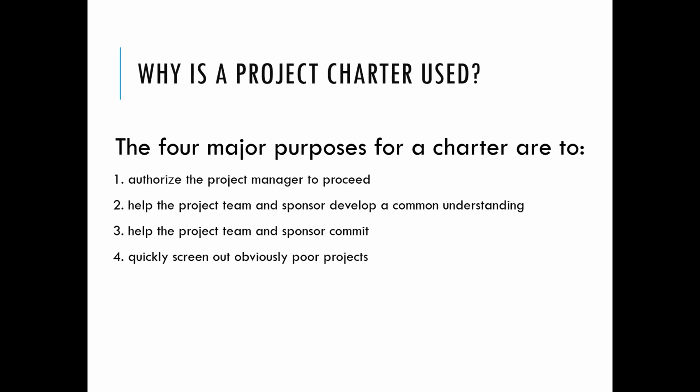Four main purposes of project charter are: it can authorize the project manager to proceed. It can help the project team and the sponsor to develop a common understanding. Project charter also helps the project team and the sponsor to commit. A project charter quickly screens out obviously poor projects.